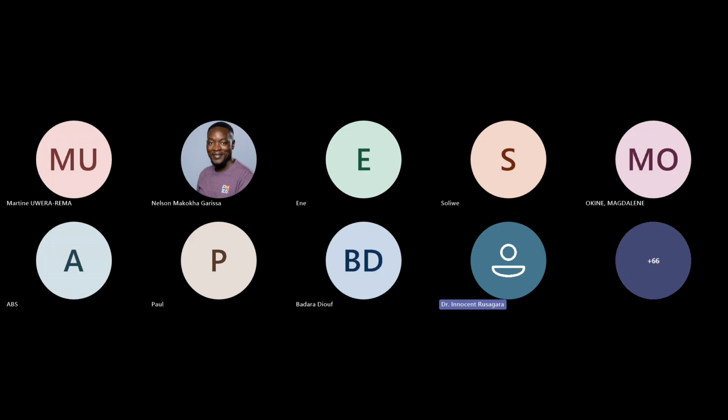For example, in the network diagram, we don't put the calendar time, we just put duration. If I say this activity will take 80 days, when we put it on the calendar, you may find that it takes just 10 days, because Saturday and Sunday weren't included. And you may even find that there is a holiday in one week, and then it can take 13 days, yet it is 80 days.